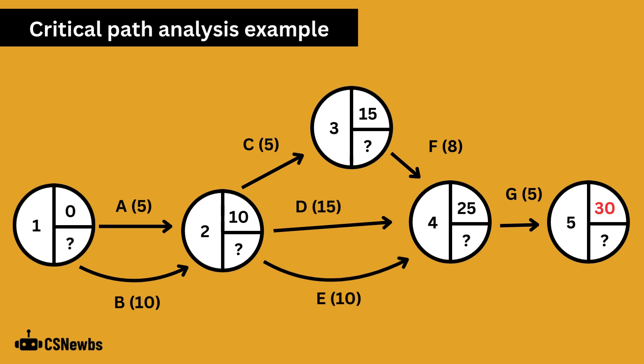The final node has an earliest start time of 30, once activity G's five days is added to node 4's 25 day earliest start time. So the whole project in this example should be wrapped up in a minimum of 30 days, as long as there's no delays and everything runs smoothly.